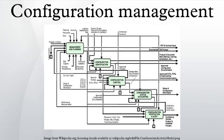The four procedures are configuration identification, configuration control, configuration status accounting, and configuration audits. These terms and definitions change from standard to standard but are essentially the same. Configuration identification is the process of identifying the attributes that define every aspect of a configuration item. A configuration item is a product that has an end-user purpose. These attributes are recorded in configuration documentation and baselined. Baselining an attribute forces formal configuration change control processes to be effected in the event that these attributes are changed.